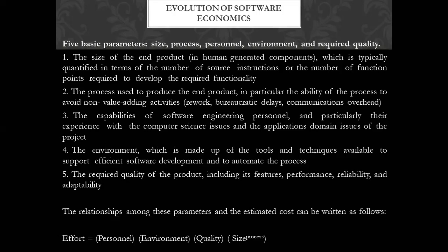In the embedded projects, this term is utilized in the COCOMO model, EAF, effort adjustment factor. So it comprises some of the factors. If you can remember a little bit of the COCOMO model, there is a list of some factors on the basis of which some values are predefined. If that factor is at high level, low level, medium level, then what value to be utilized. So it is talking about those factors only.